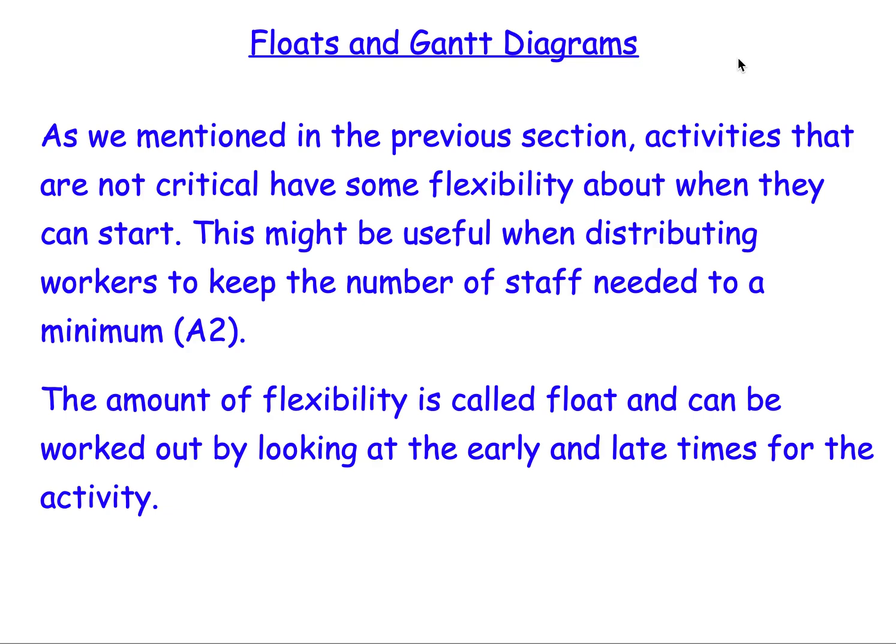Now that's going to be really important for our A2 work, because in A2 we'll have extra elements added to the question. For example, the number of workers it requires to complete an activity. And what we'll have to do quite often is find the most efficient and cheapest way to get a project completed, using the minimum number of staff as possible without delaying the project.